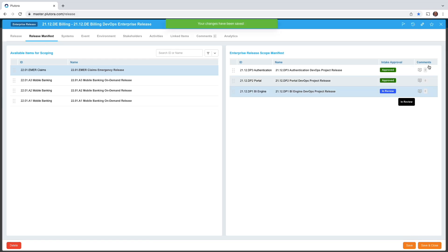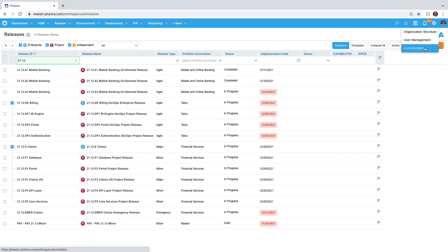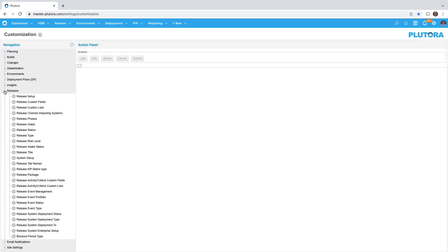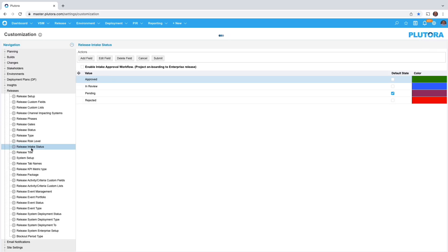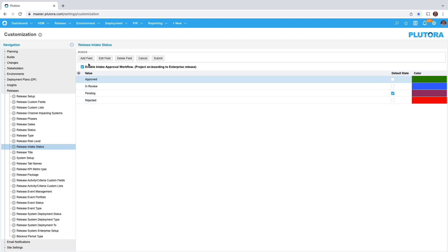Intake approval is configurable. You can create a little workflow. If I go to customization, releases, release intake status, I have four statuses here with a default status of pending and color coding. If you'd like a different set of statuses for intake approval, go ahead and add them here.